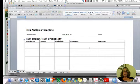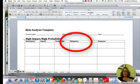You don't necessarily have to have these two columns, but these two columns are going to be really important. Mitigation, that means if you have this particular risk or this event happening, is there any way that you can avoid it? Can you put double checks in? Can you use something else? Is there any way that you can take care of it? Can you get an early warning to it? Is there anything you can do that would mitigate it?